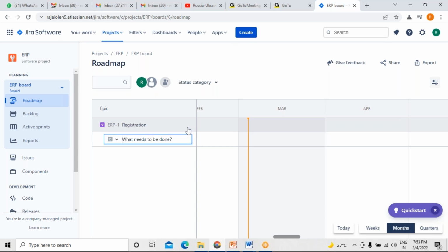For example, you are writing a user story here. After you have completed all the user stories, there is prioritization of the sprint and sprint planning. Then people have started working on it. On a particular functionality, there is a bug which was identified. So what you have to do is go to the roadmap, wherever the functionality is, in reference to the particular epic. There you can select an option for bug and write down the bug.